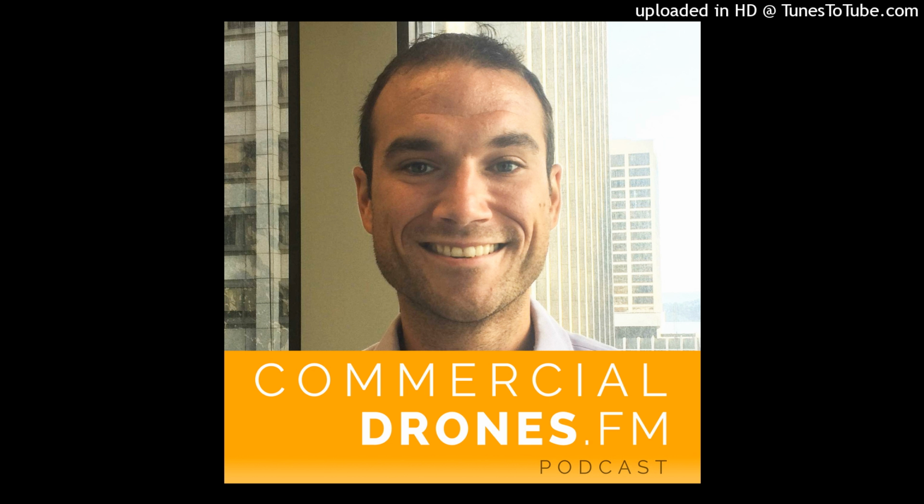Primarily, what we found is that drones are really good, as you can imagine, in surveying. When we're doing precision surveying using photogrammetry, drones provide a really good solution. Actually, our surveying department last year did a bit of a study and found that there's a 2-to-1 cost savings using drones over traditional surveying methods. So the ROI is there already.